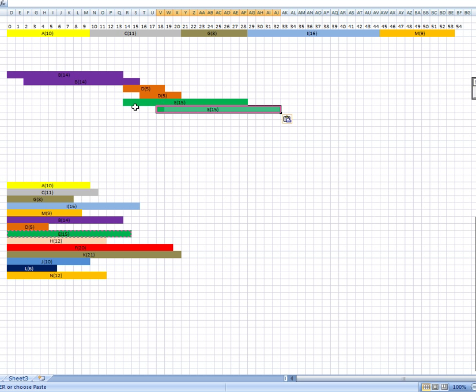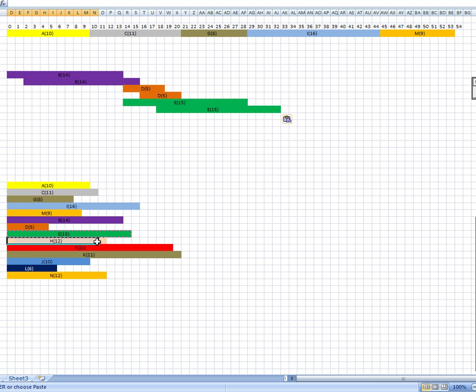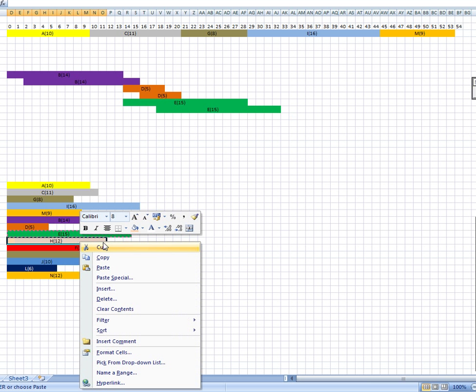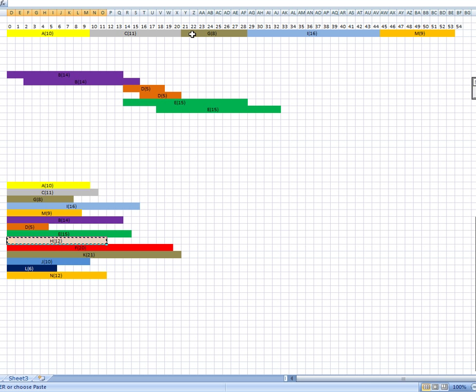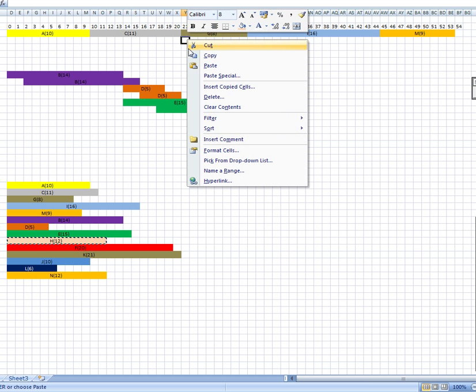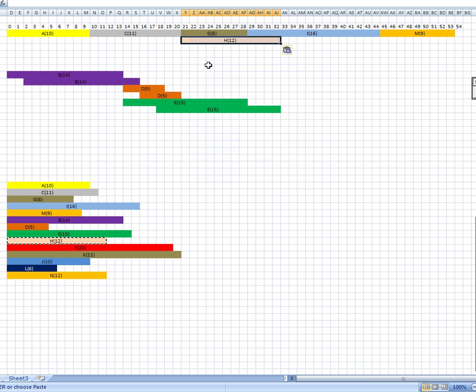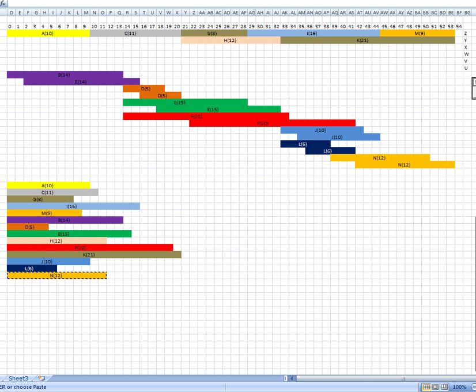Imagine this bar floating. It can go from here to here. That's a 4 days float. I'll do one more and then I'll fill the rest in. Sorry, this is H. It's not that I at all. H is a critical activity starting at 21, finishing at 33. And there is no room for maneuver there. I'm going to put H here. Starting at 21, finishing at 33. Right, so I've finished the Gantt chart there.